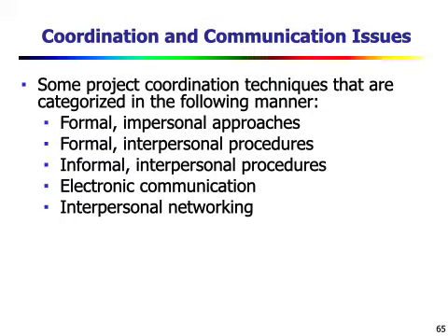A statement of software scope must be bounded. That is, quantitative data like the number of simultaneous users, size of mailing list, and maximum allowable response time are stated explicitly, constraints and limitations are noted, and mitigating factors are described in order to bound the software scope. That is the first step in project management.